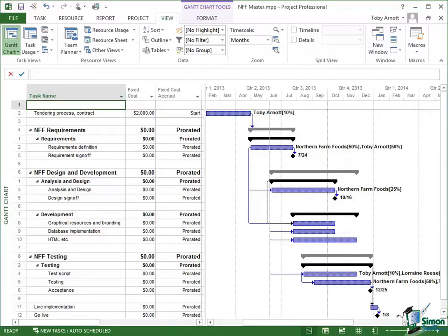of design. So I go away, I look at the last website development project we did, I look at how much more complex this one is, but on the other hand how much more we've learnt, and I come up with some figures and say, well, based on past experience and based on what I think's involved here, I think we're going to need about 900 hours of our own time, in-house work. So that's roughly 100 days, a bit over 100 days of work for internal resources, and I'd say probably about the same amount of time from external resources, say about 900 hours of external resources, consultants, web developers and so on. I'll also look at the likely costs.